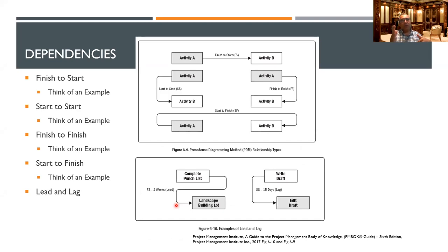So you're starting to write the report, and the start to start relationship is that once you are writing it, think of it as very similar to start to start. This one here, if you see, is start to start, meaning both of them start at the same time. Here, it's a start to start with a lag of 15 days. This is going to start 15 days after you started on this one.